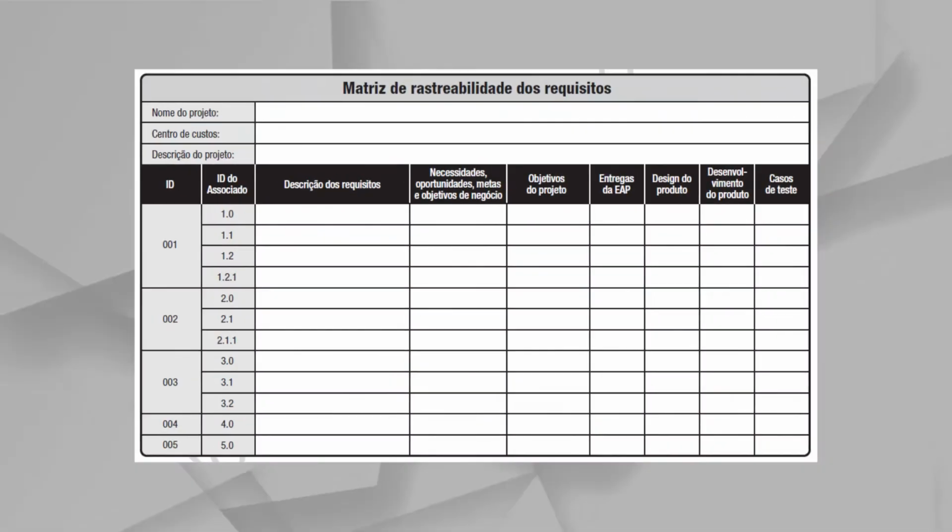The requirements for your project to exist are usually tracked in a matrix called the Traceability Matrix. This matrix is the Bible in your customer's eyes, because here is where you tell them where each one of their needs will be delivered. In agile projects, this list becomes a backlog, and phase by phase you sit and define with your customer when they want which feature to be delivered to them in a smaller chunk.